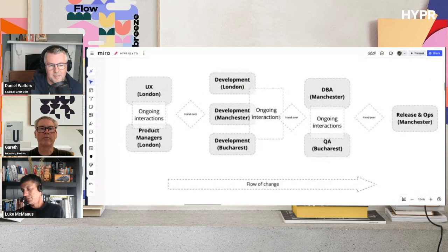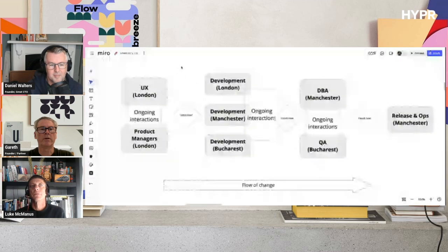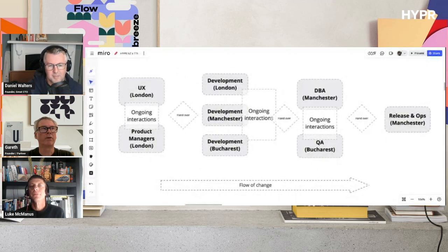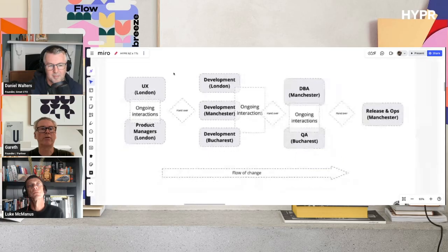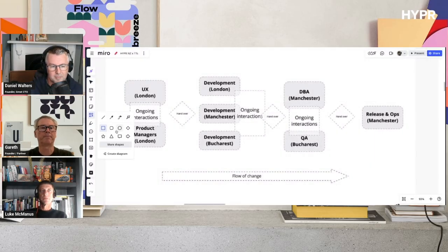Yeah, and I think you just mentioned something really important here as well. It's not just the work that's flowing through the system that we're interested in, it's the context around the work, and the information and decision flows as well. And I think that's something that people lose. You think of the original definition of a user story, as card, conversation, confirmation, and the conversation was the context that followed the work, and you can't easily transfer that, right? If you've been working on something for a week or two, and then you've got to hand that bit of work off to someone else, that context is very, very difficult to transfer at that stage, and so the costs are higher than people realize.